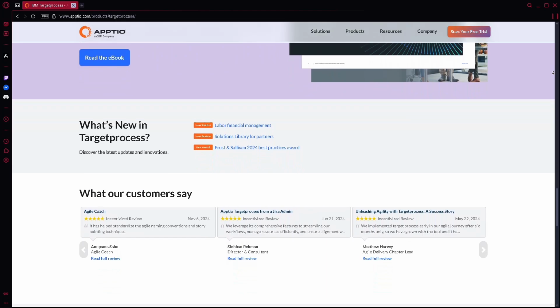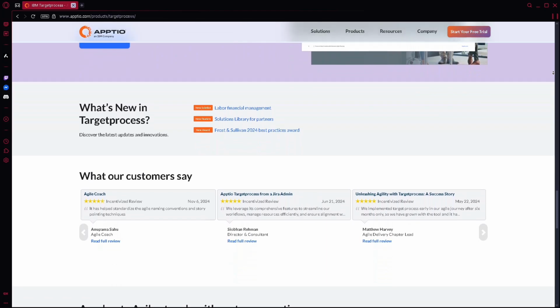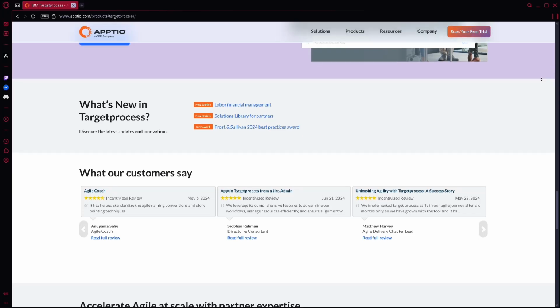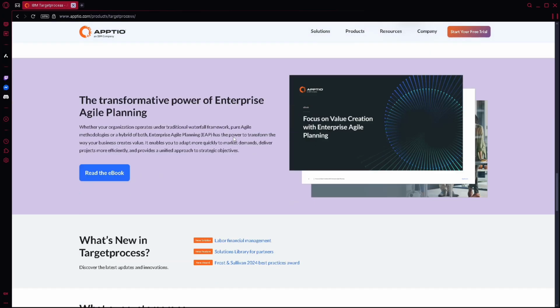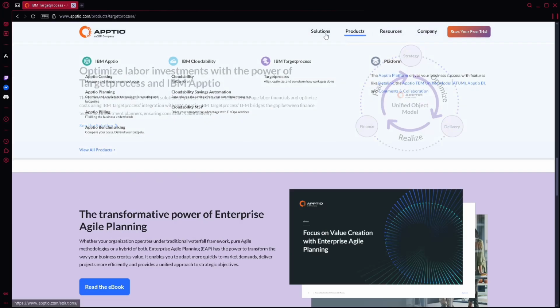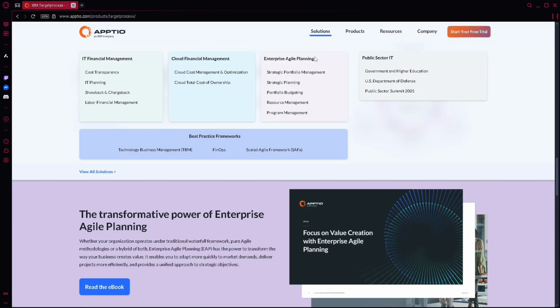Now on managing agile workflows. To create a user story, go to backlog, then click plus add user story, assign to a feature, team, sprint, and set priority. To plan sprints or iterations, set timeframes, capacity, and goals. Drag stories into a sprint from the backlog. Now, to track progress, use boards and timeline to view status. Update items by dragging between lanes or editing fields.